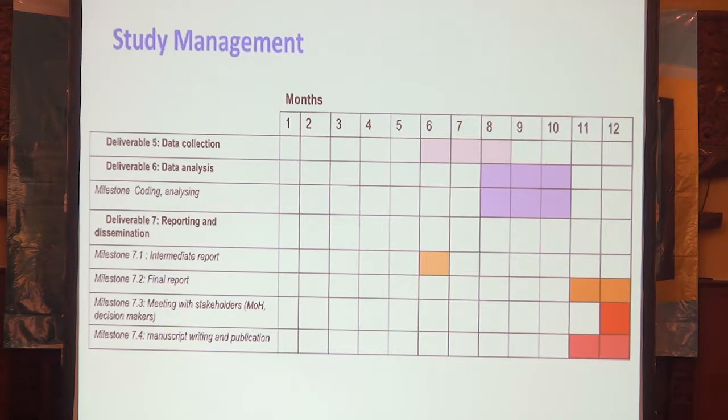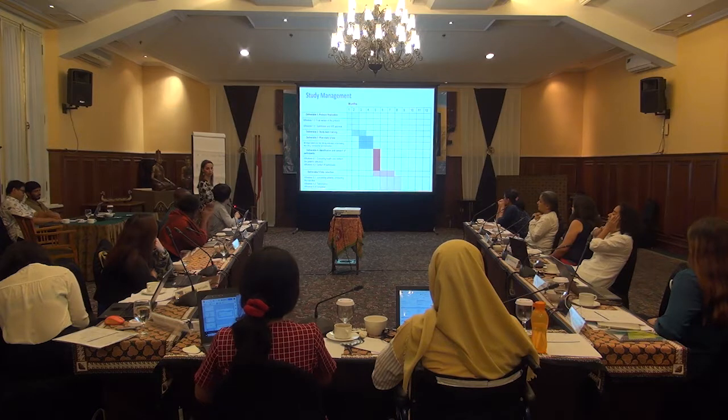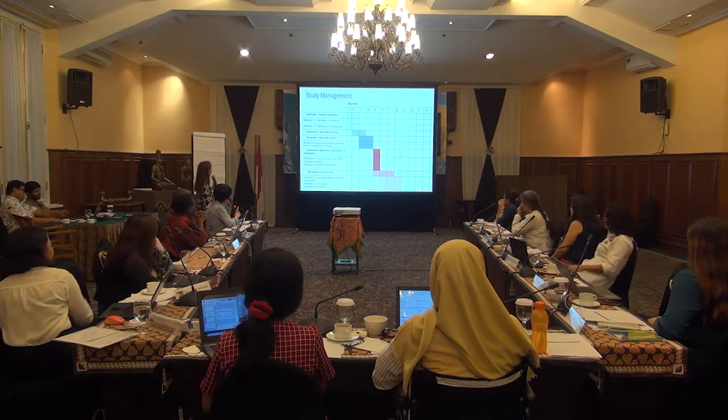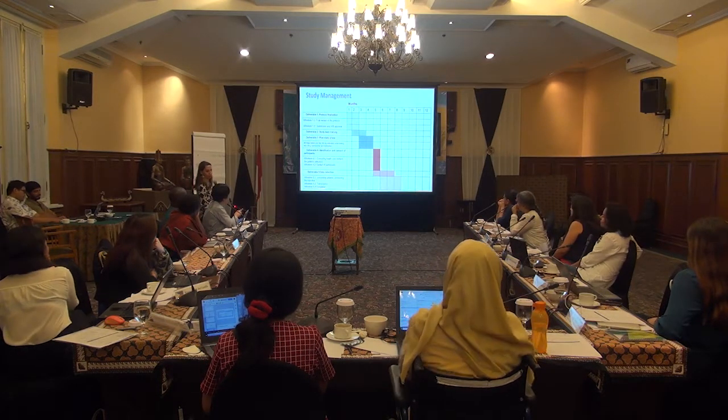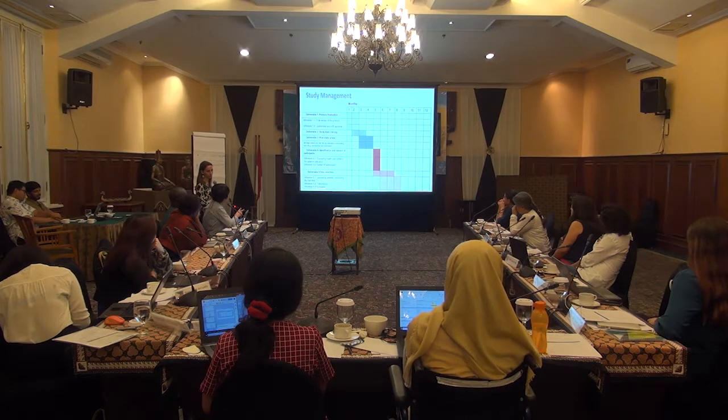Any suggestions? Questions? Yes, about milestone 1.1 and 1.2. I don't think that can be in parallel. You have to finish the protocol first to submit, and then submit to the IRB.